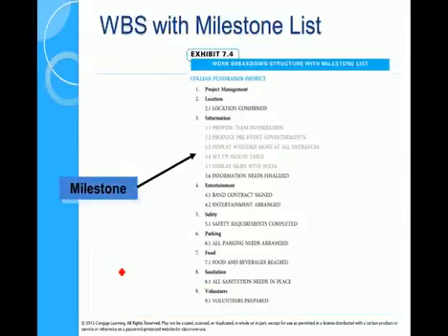We look at the project in its entirety, and we have the work breakdown structure from the scope process helps us define those activities. And this work breakdown structure might have a key deliverable, that is, all the information needs are finalised. So that deliverable could be a milestone in our project. These are the work packages written as activities. Notice how they have verbs there, that need to be complete to finish this milestone.